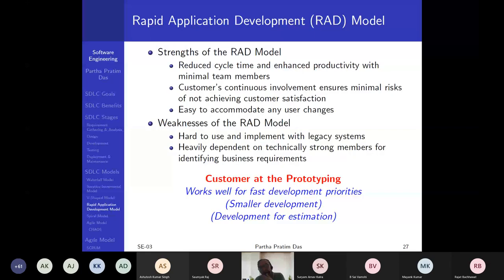So if say a railway reservation system is of 100 man-years effort, then you could probably spend a 5 man-year effort, say 10 people working for 6 months, to make small prototypes of different components and get a better idea of what is really involved. And that data can be fed to the estimation of the project cost.